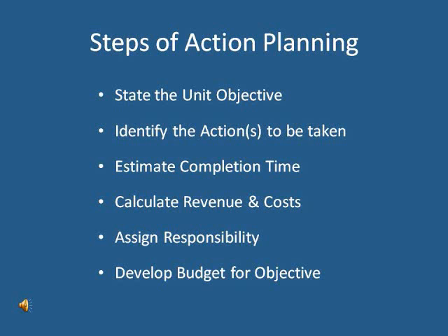When identifying the actions to be taken, it would be helpful to also add the estimated completion time for each of the portions of the actions to be taken, so that when you add up the total amount of time for each of the actions that are to be taken in completing the objective, the estimated time equals the amount of time identified for each of the steps within the actions to be taken for the unit objective.